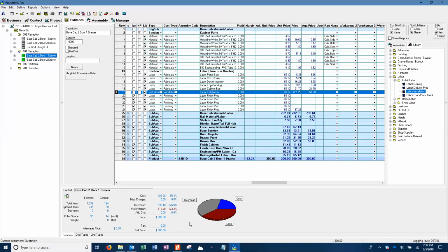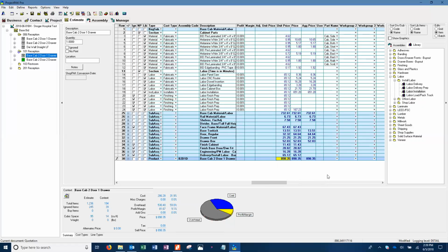So while using that to manipulate is really great, you need to remember you've done that, so that if you then go back and you need to add something to it, you remove that. Because if we remove that 300 right now, just backspace right over it, right in that adjusted unit price where it says 300 in black. Last row. There you go. Just delete it? Just get rid of it, yep. Just backspace over it or highlight it and delete it. And then tab over. Our price immediately becomes what it should be with our new fun installation that we threw in there.